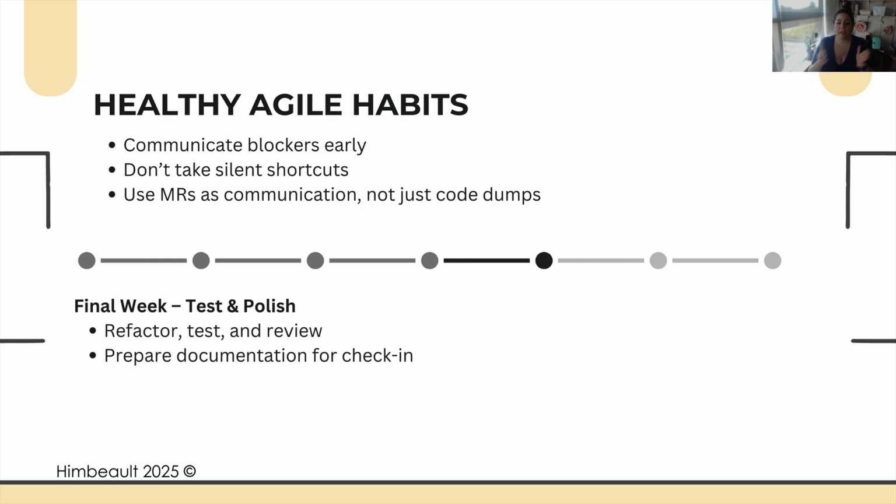And then within our final week, this is sort of that code freeze point that I was talking about, right? At this point, we're doing our refactors, we're testing, we're reviewing, we're preparing our documentation for our final check-in, for our submission.